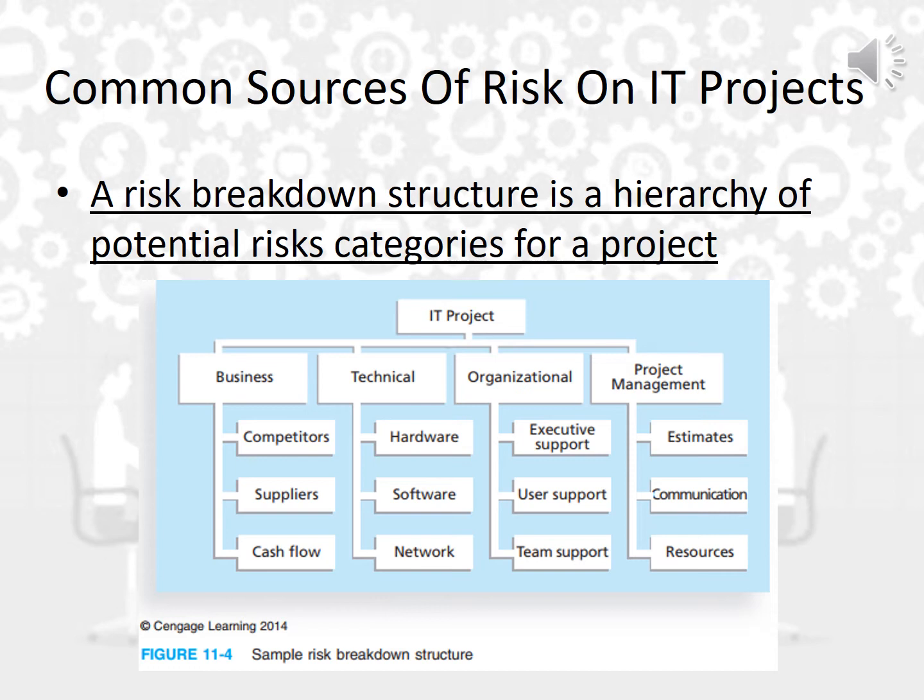So, hardware could be broken down further to include malfunctions, meaning that the instrument, the hardware itself, is not working for whatever reasons. So that's a risk. Availability, whether it is available on time or not, that's also another risk. And also cost. So if I create it and it is working, yet it is expensive, I may have a risk of selling it or distributing it to users.